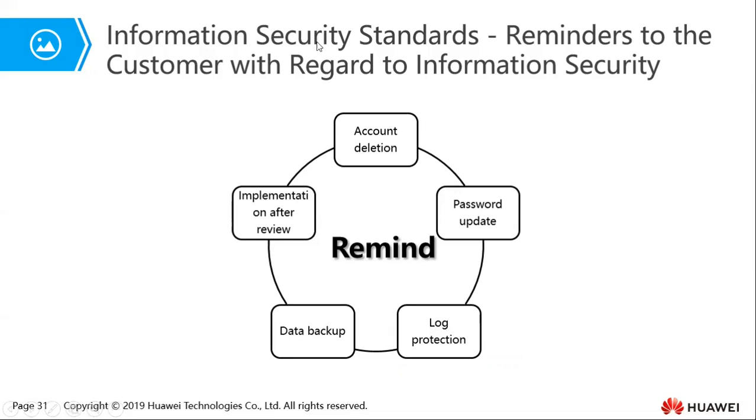Now, these are some of the reminders to the customer with regard to information security. After you are done with implementing the project, one of the information security standards is that you're supposed to remind the customer to delete any accounts that were used for testing, for example, the accounts that you might create just for testing the system. So you need to remind them to delete them.